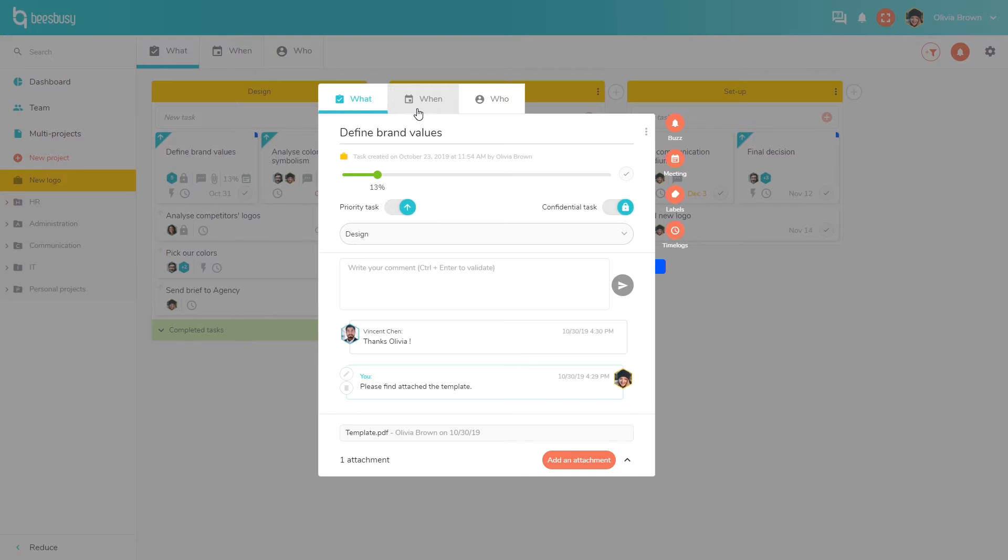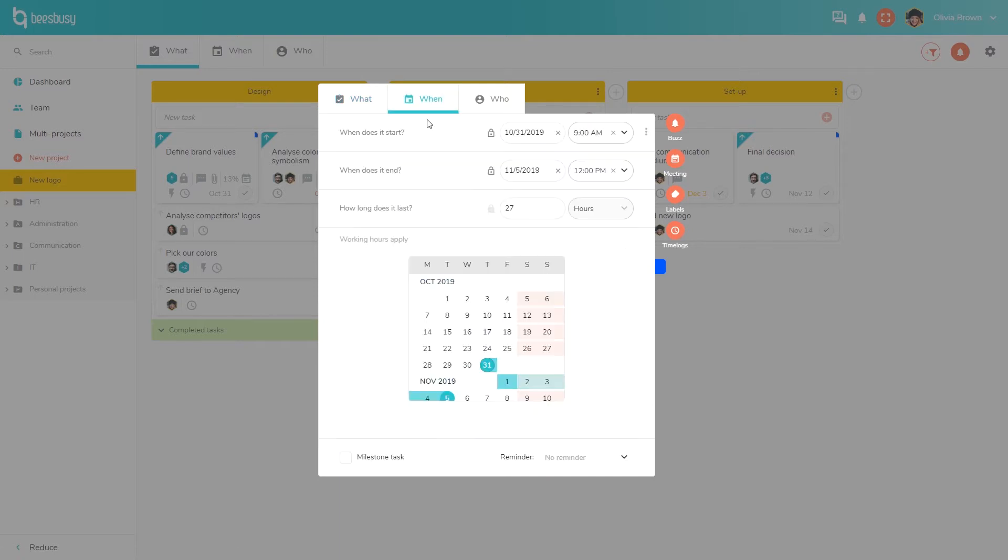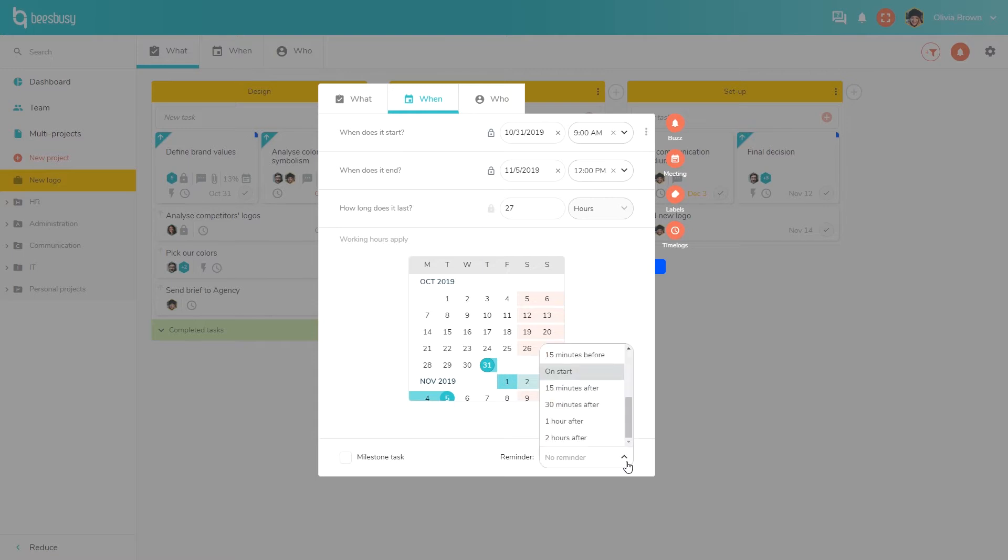In the When tab, you can schedule your task, set up a start and/or an end date, or a duration. And you can choose if you want to work with days or hours. You can also use this calendar here to schedule your task, and you can set up a reminder. You can also mark this task as a milestone task, but I will also get back to this later.